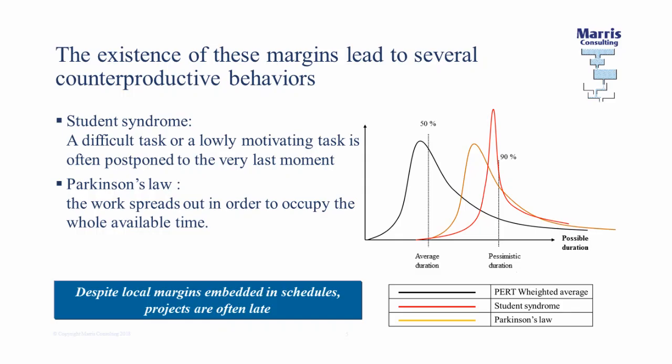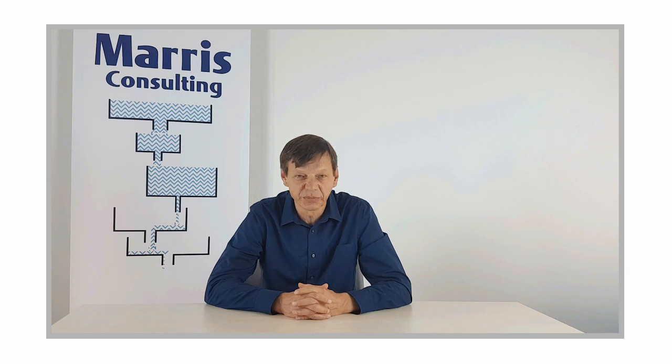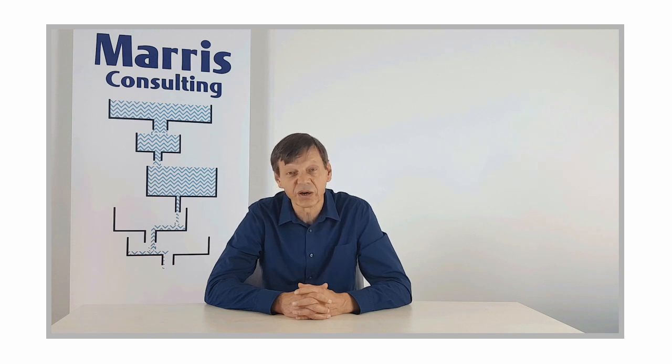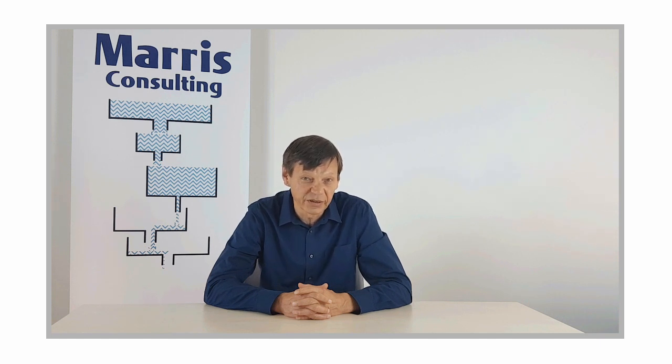So that's how we have the strange situation in which we thought we had a number of tasks, each of them with a safety factor which would ensure that the project would finish on time. In fact, what's happening is that those safety factors that protect are all being wasted. So anytime anybody gets ahead, that advantage disappears. And it's only the problems, only the things that are overdue and late, that turn up and get passed on from one stage to the next. So you can never finish anything early in reality. It's only things that get late that will accumulate across the system.